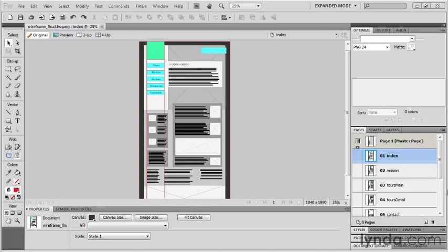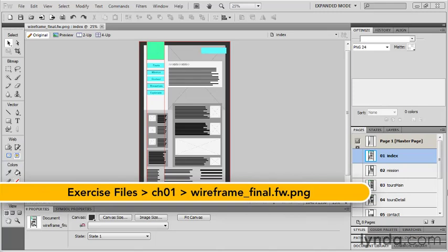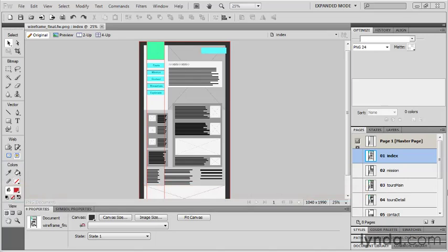Creating deliverables doesn't just help open or maintain communication between the designer and the client. They can also act as billing markers. Once a deliverable has been submitted and approved, it marks a point where the project can move forward, and because you've supplied a tangible product, it's a great point at which to submit an interim invoice and keep that cash flow flowing.